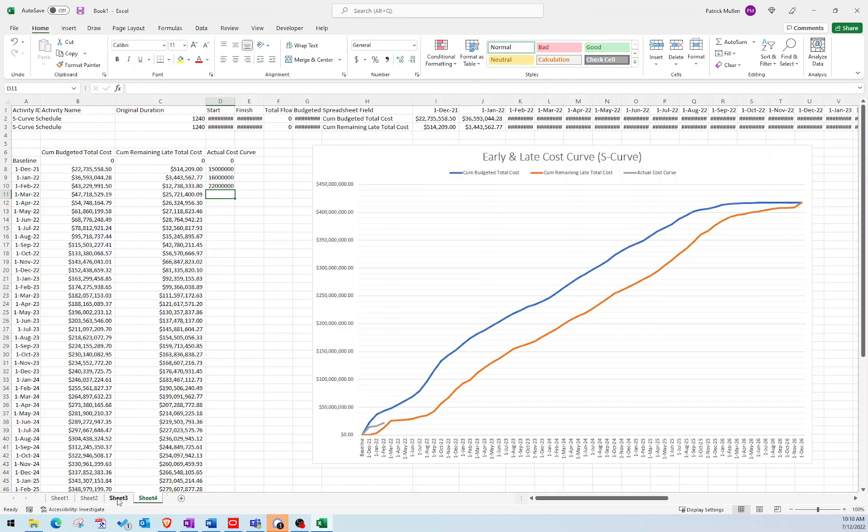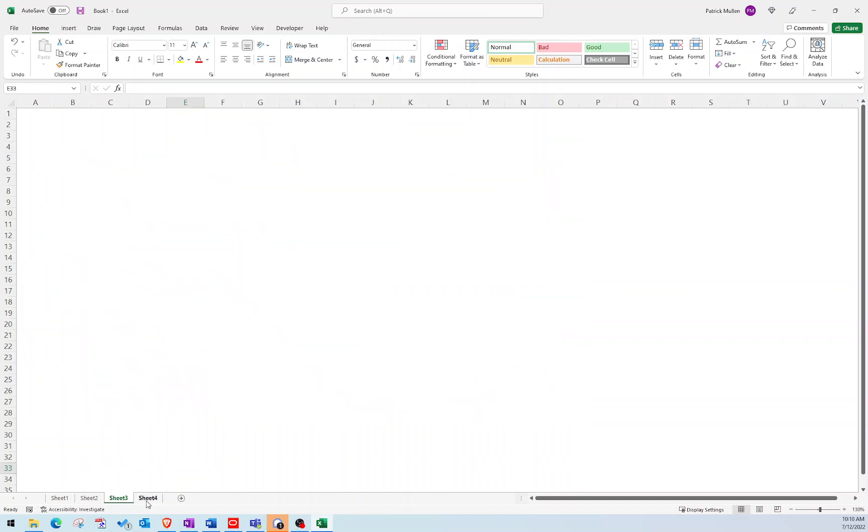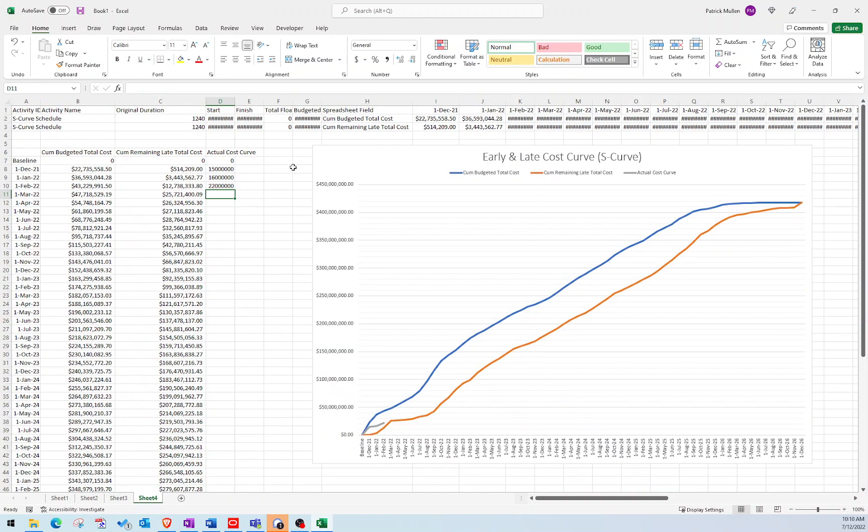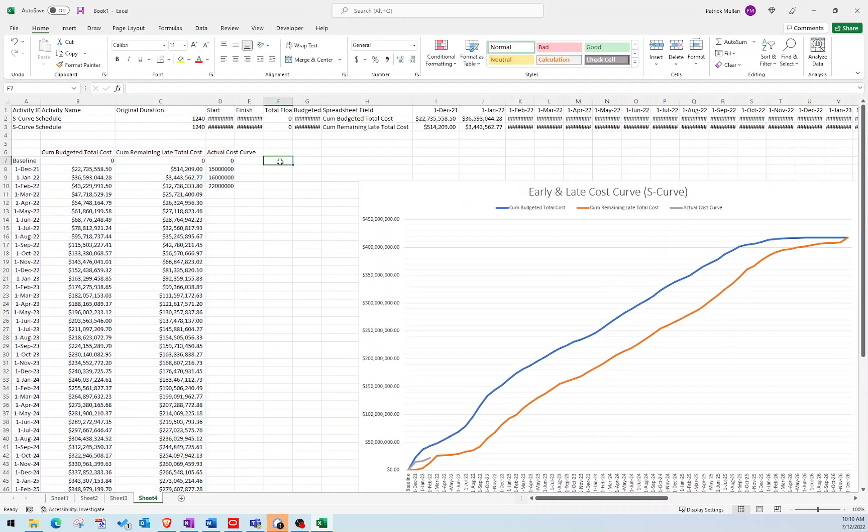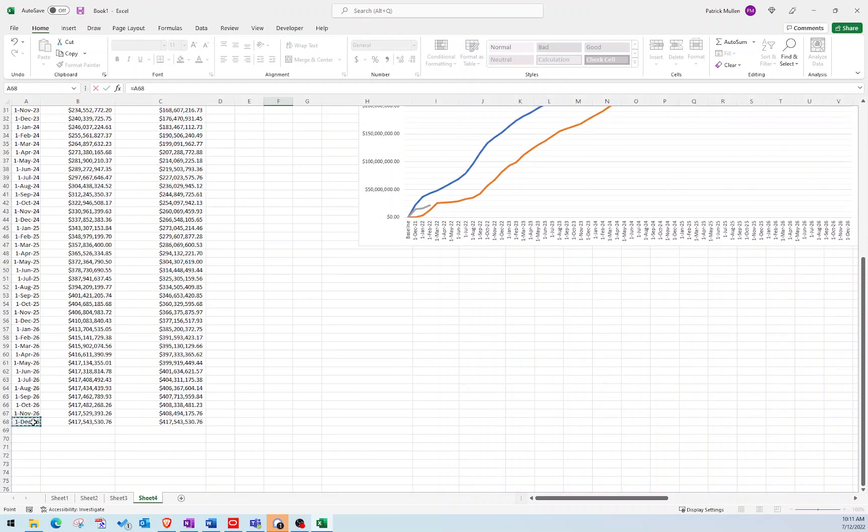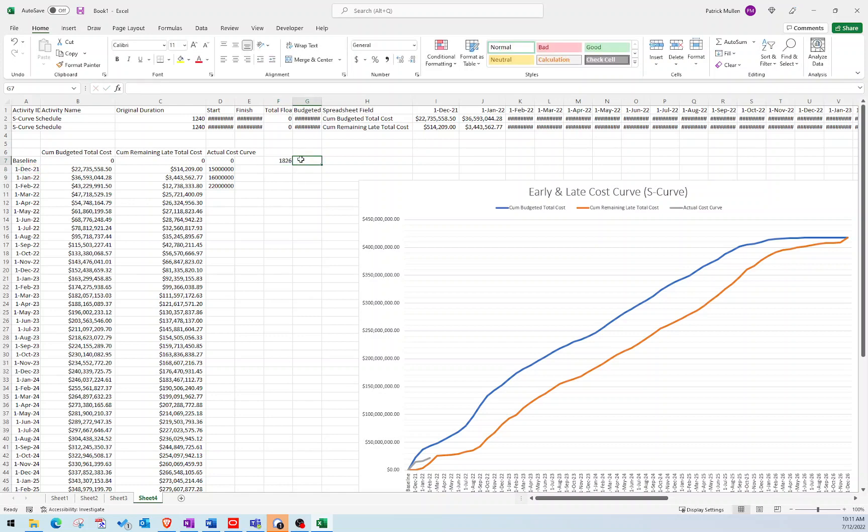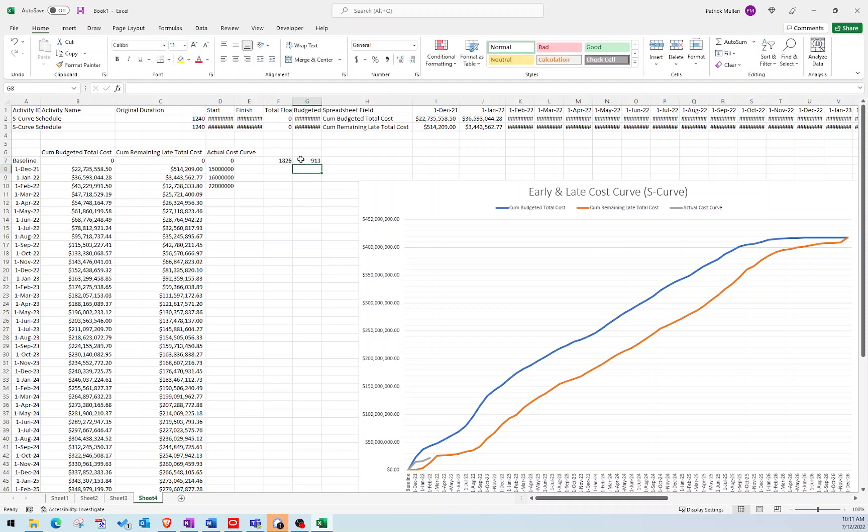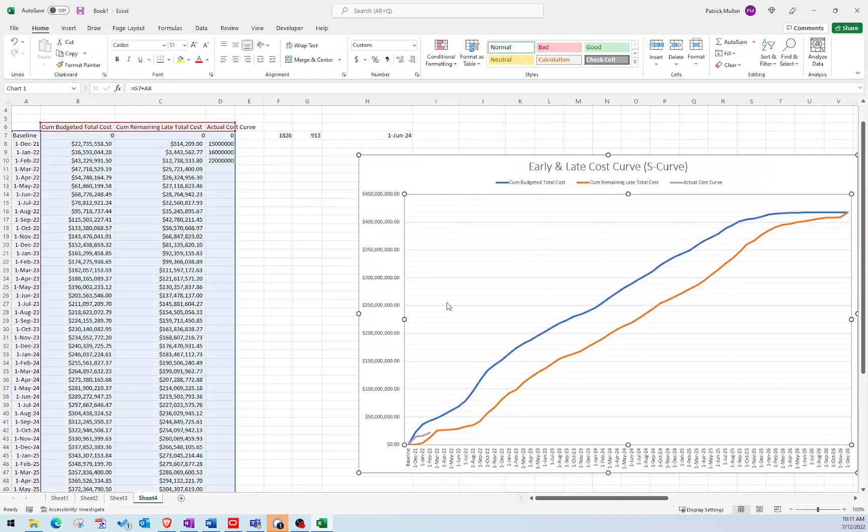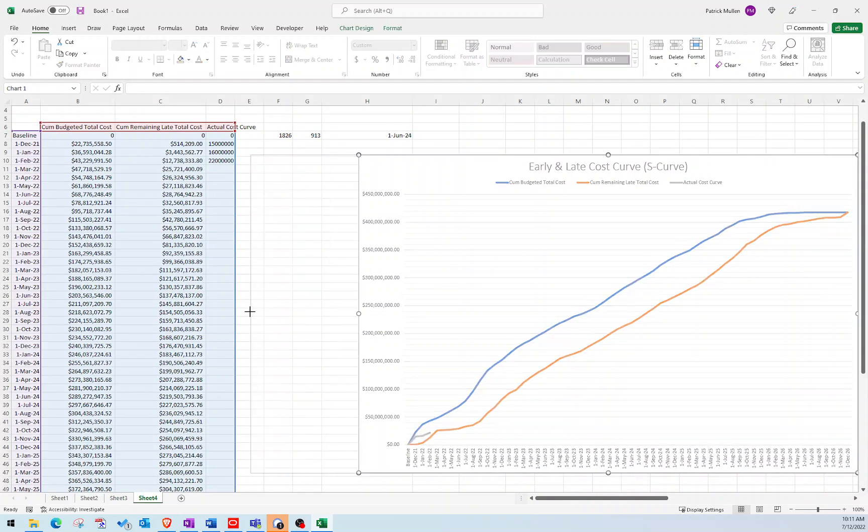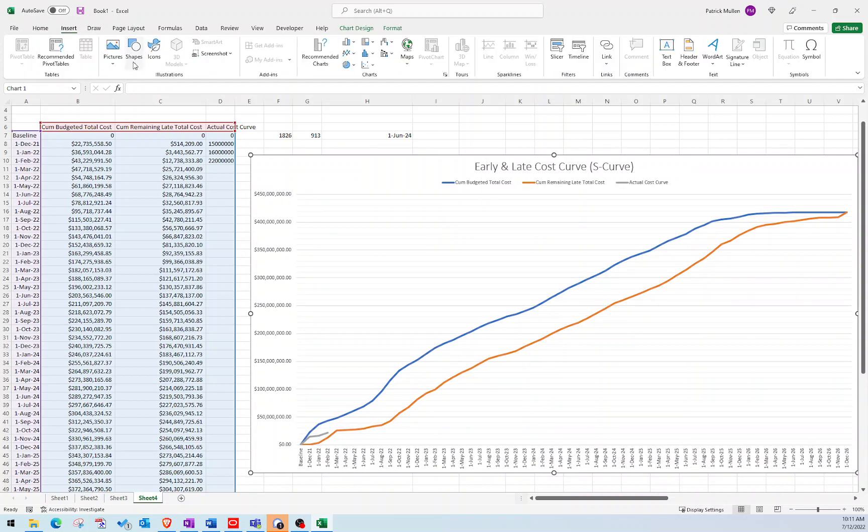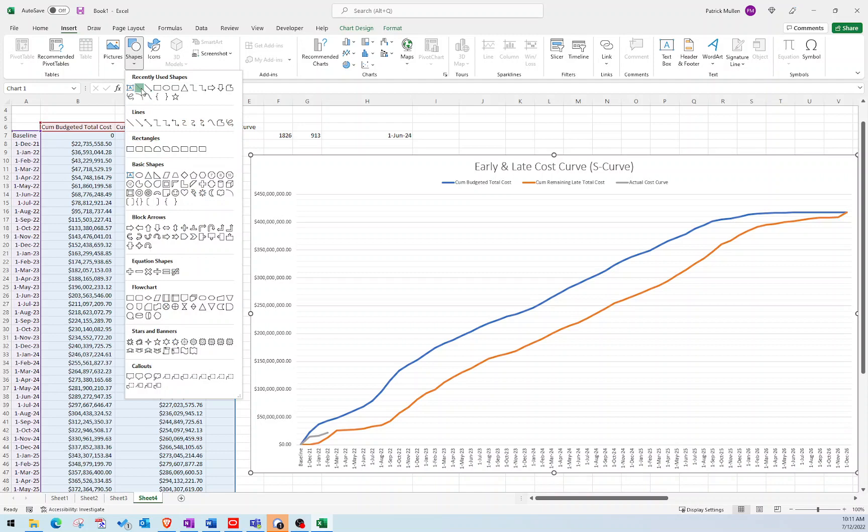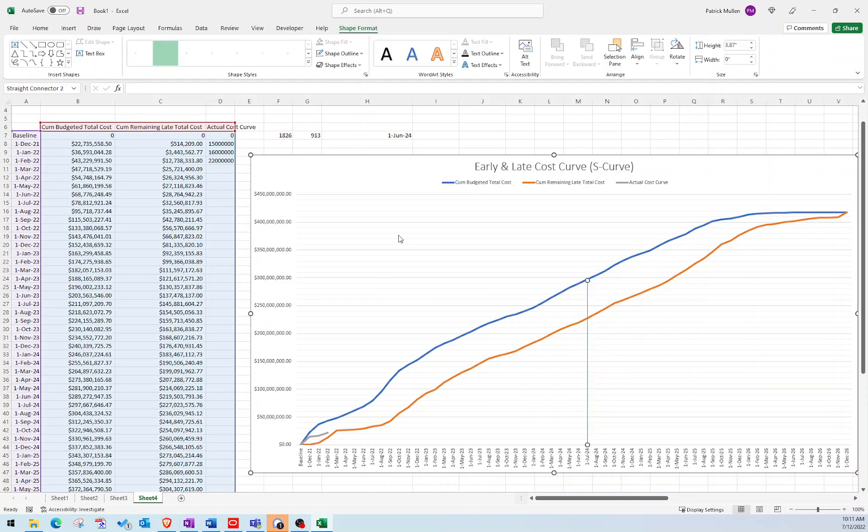And then the other thing that I like to do, I added this midpoint here. So if I'm trying to find the midpoint of the project, what I would just do is I would just do an equal sign. And I would just take my last date and I would subtract it from my first date. It's not a perfect science, but it's pretty close. And then I'm going to take that number and I'm going to divide it in two. And then I'm going to take that number and I'm just going to add it to my first date, which was that December 1st. And so that gives me June 1st, 2024 is roughly the midpoint of the project. And so if I want to just draw a line on my midpoint, I can find June 1st, 2024. And that's my midpoint.